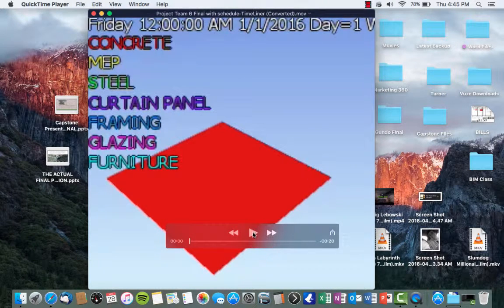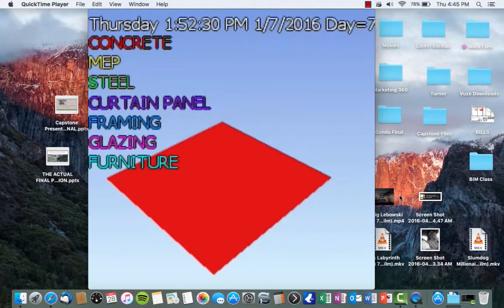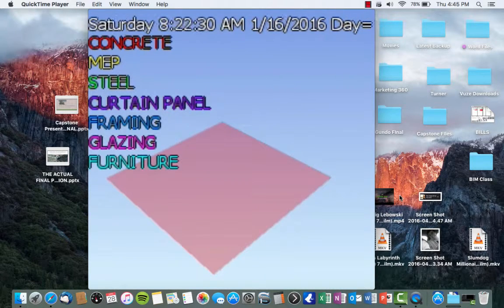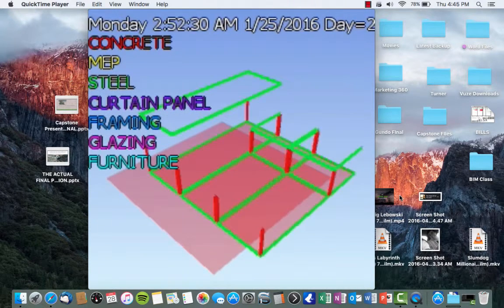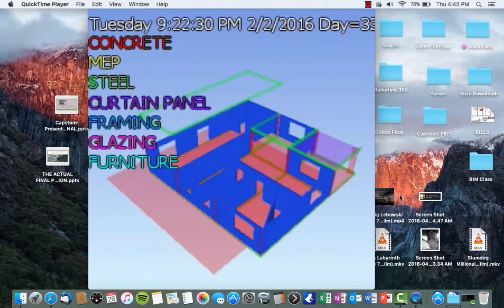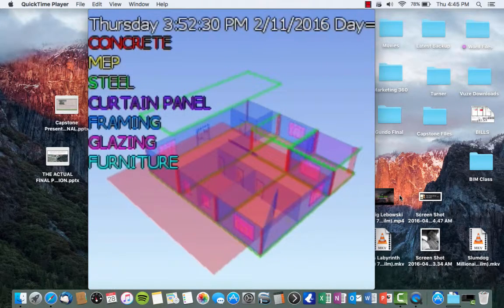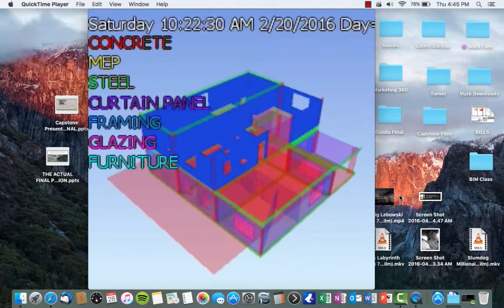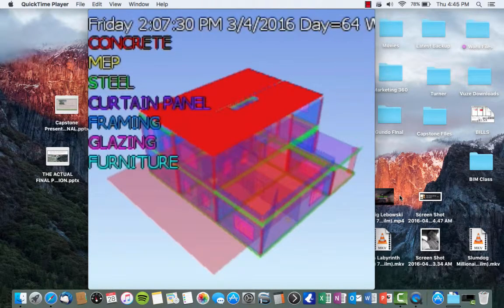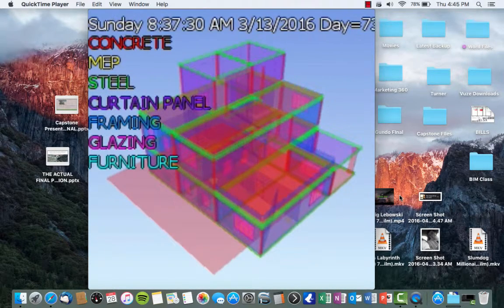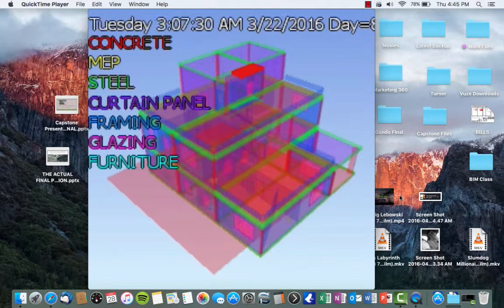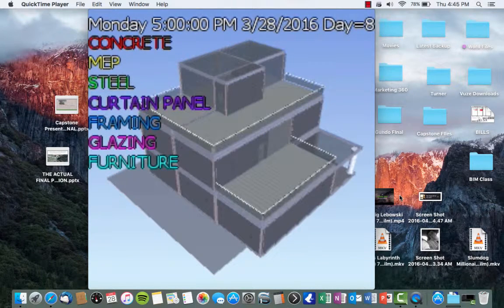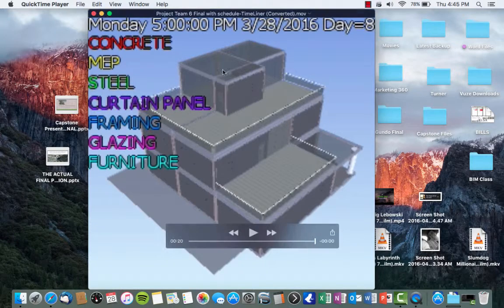Here is our 4D walk-through. As you can see, it starts with the concrete slab here at the bottom. After that's completed, we'll begin the first floor with the steel structural frame. As we move forward, getting the interior walls completed onto the second floor. And then moving on onto the third floor, where you can see the street, the two balconies will be along with that final room. And again, here's the final look at the project.